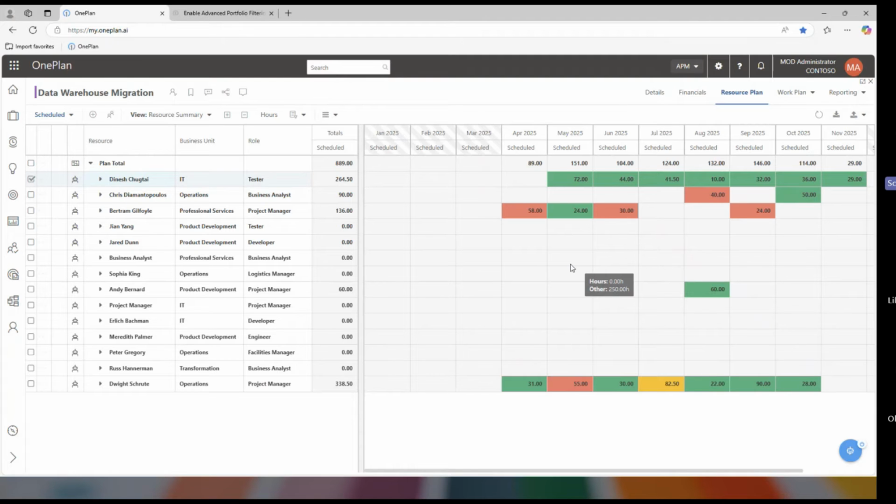It is the most challenging type of resource planning because it involves really creating a detailed schedule and keeping it up to date, each task, right? So if a task slips, you're going to make sure it has the successor dependencies on it, so the tasks that are downstream will also slip, right? If someone completes a task early, you want to bring things in. If you change assignments on a task, it really does work great.